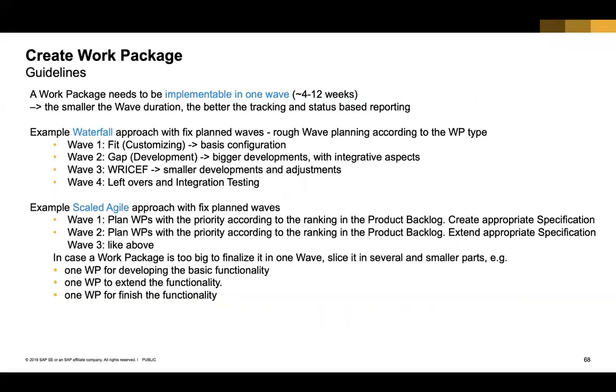Of course, we can also do waterfall versus scaled agile type of delivery. If you want to do waterfall, typically customers go with an approach as an example where wave one is customizing-related basic changes, all done in wave one, then gaps or developments are done in wave two, write-ups are done in wave three, and whatever integrations, including integrations into third party, are done in wave four, right? So that's one example of how customers define waves. Even if you're following waterfall, you could still divide waves, which is essentially scoping the work to be done in multiple chunks within the build phase. So you could still do that.